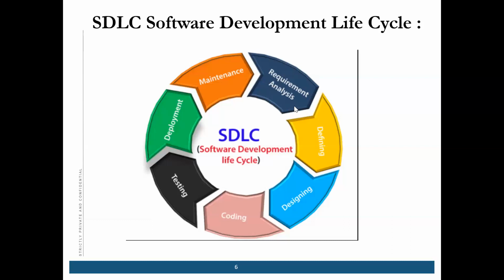Let me add a little bit so they're more comfortable, because some people are not used to working in a real-life development cycle. What happens is that just before every release, they have meetings. A developer group is there, the tester group is there, the integration team is there, the process management team is there, management is there, right? And they'll discuss what all changes are happening and what we need to pay attention to. Then they'll tell you that if there is a database change, you have to put it in your notes all the way on the top saying that there is a database change.